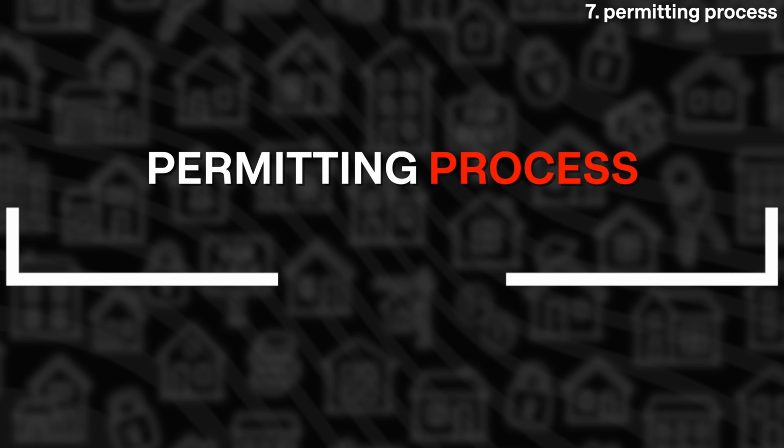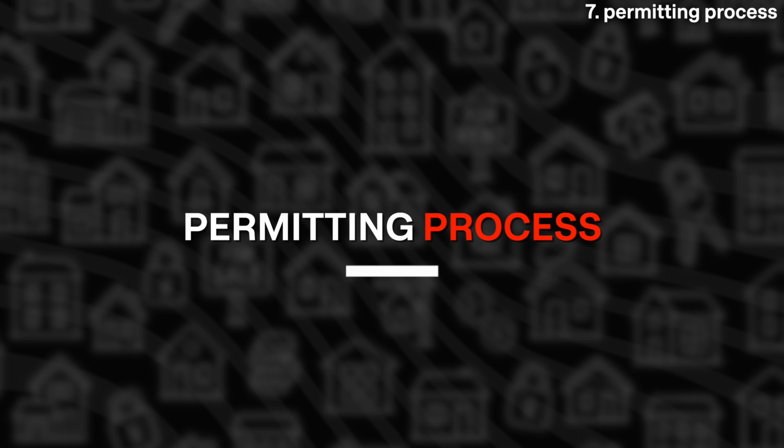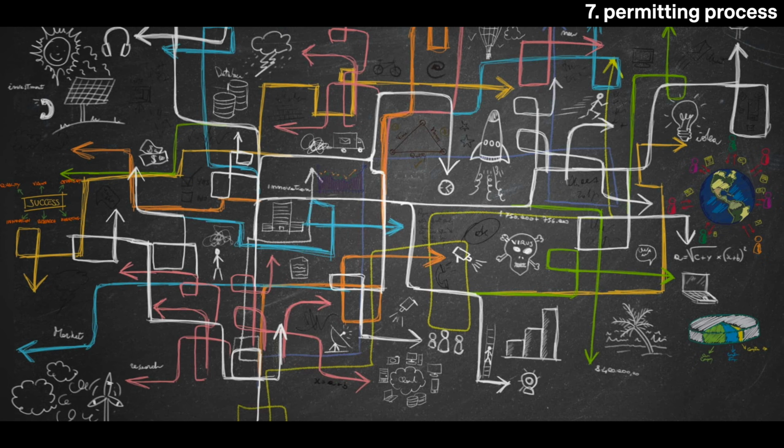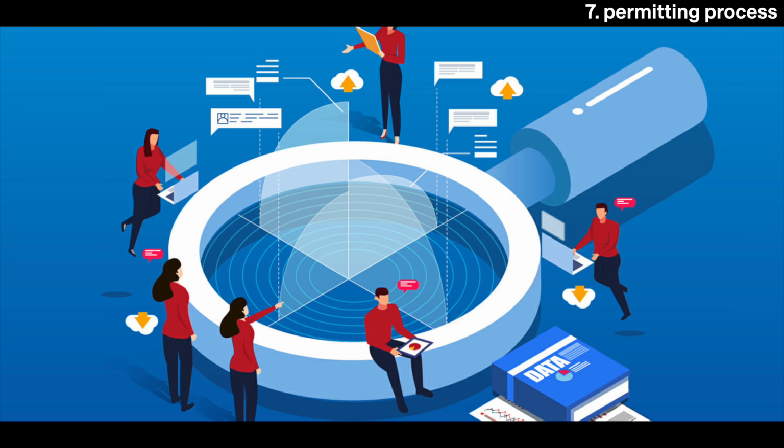These meetings help you catch issues early, avoid delays, and ensure that your team is always moving toward a completed set of plans that are coordinated, buildable, and cost efficient. Next, submit your plans for permits. This process can take anywhere from 4 to 8 months, but the timing can vary significantly based on the city, the complexity of your project, and the number of departments involved in your plan review.